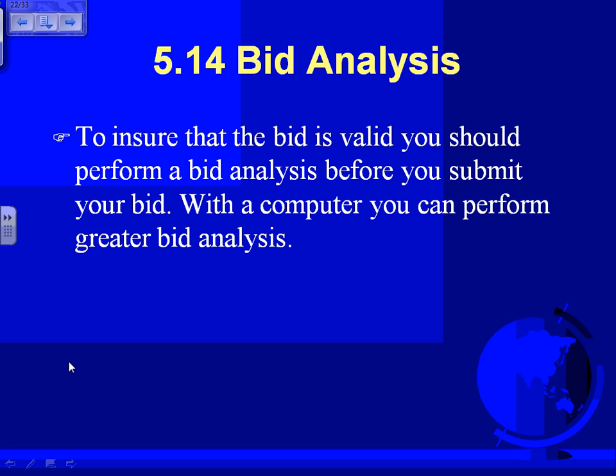Bid analysis, guys, there are two ways of bid analysis. I want you guys to go, please, to page 80 in the book that you have, page 80. Page 80 has a few things that you can do for bid analysis. Number one, you take the labor, the percentage of the labor. Can you guys see that in the bottom left of page 80? You have labor percentages. So my labor percentage is 19%. Now, Chris, if every job that you do, the labor was 25 and all of a sudden the labor is 19, that's a flag. Flag one.